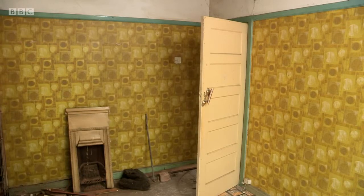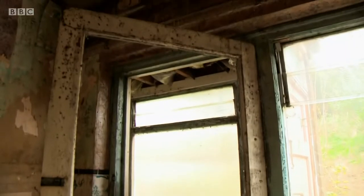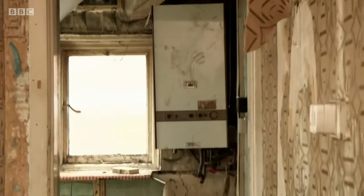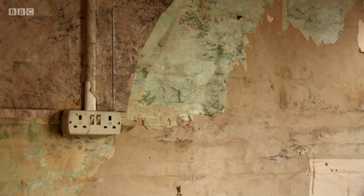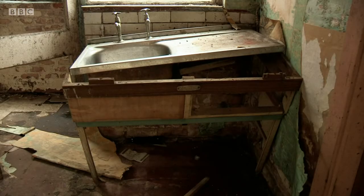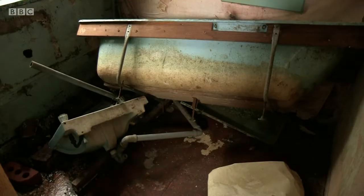The first plan is to take off all the plaster, ripping everything out. Double glaze all the windows and doors, and everything will be fitted. Tomorrow, 8 o'clock, the guys will be here. Central heating, pipes, and the refurbishing electric wiring, the guy will come this week probably. And kitchen, we're going to put in a brand new kitchen. Downstairs bathroom, we are making a downstairs bathroom. And then upstairs, a new bathroom. Make a separate wall inside the new bathroom as well.